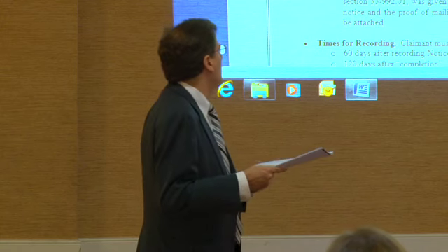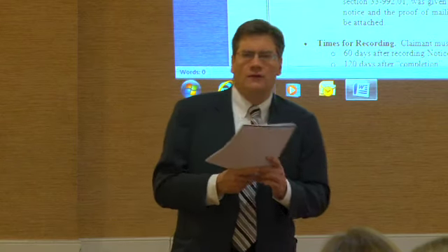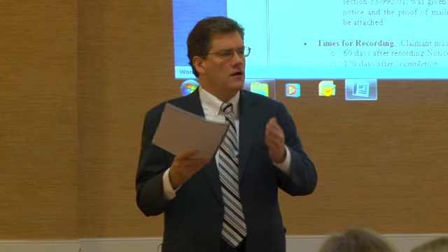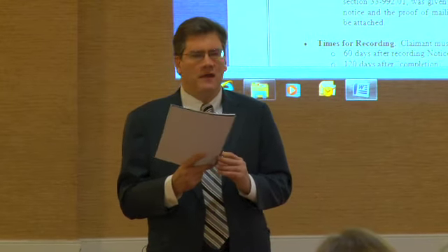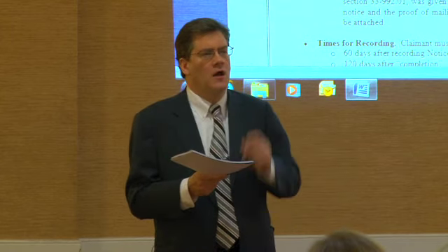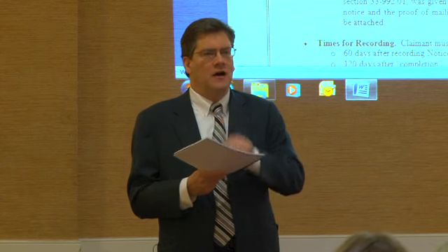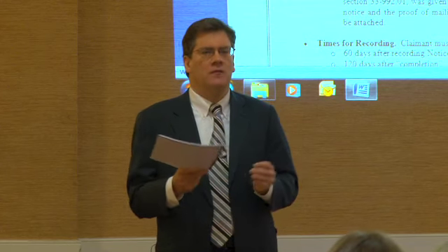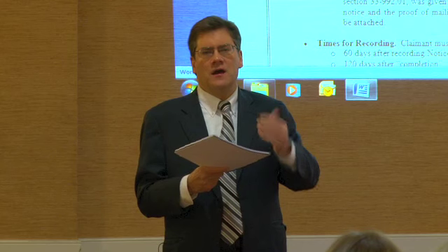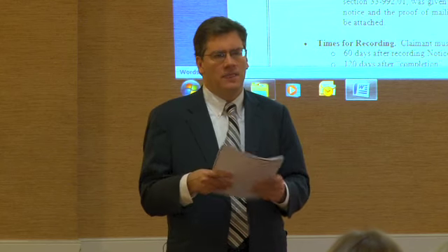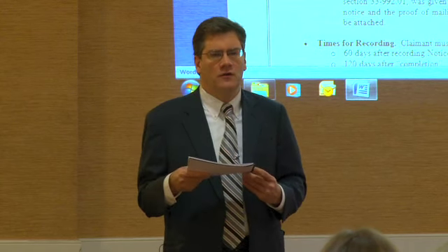All right? A statement of the terms, the time given, and the conditions of the contract if oral, or a copy of the contract if it is written. Listen, your contract with your customer may be 20 years old and you lost it. That happens all the time. The problem in that instance is that the courts are beginning to require written contracts attached to the lien claim if there was at any time a written contract. It used to be that, hey, if I can't find the contract, we're just going to describe what is in the contract itself as a part of the lien claim. The terms are 30 days after the invoice date or when it's due, 10% per annum interest, yada, yada.